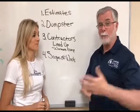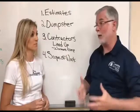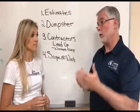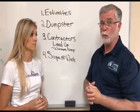So when do the cabinets get laid? Typically after the tile goes in. But if you're not replacing them, are you going to lay tile around the cabinets? These are decisions that need to be made prior to closing, so that you've really got a roadmap and a timeline. The timeline is the most important thing.